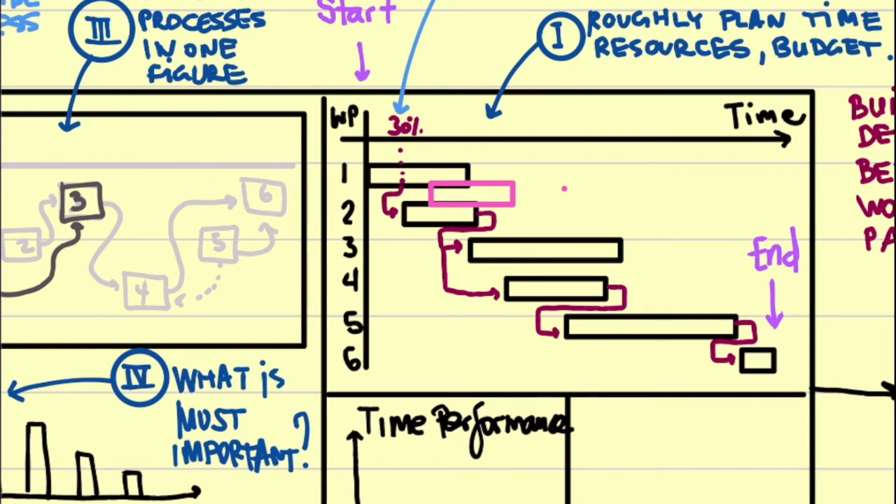And this is changing some part of the plan. And this is also changing. This is 1.1. This is also changing the dependencies. It is of course delaying the whole thing, because if I cannot start number 3 and number 4 before I finish 1.1, this all goes being delayed.